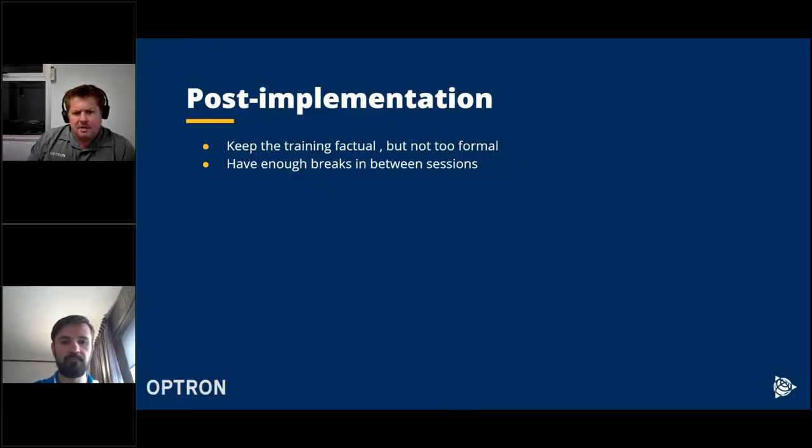Have enough breaks in between sessions, because once again, PowerPoints, unfortunately, are not always very interesting. So you have to have breaks to let the guys rest a bit as well. And it's a lot of information to take in. I've also found that sometimes it's easier to schedule, for instance, a 2-day training session for a new customer, and then in that quote, we've also built in to go back, let's say, after 3 months to do another 3 days. Because if you show them everything in the beginning, it's very overwhelming, and you might as well almost have shown them nothing.